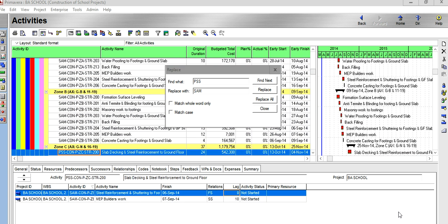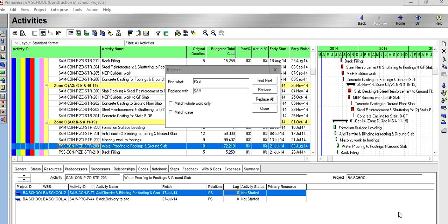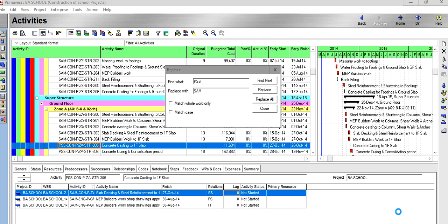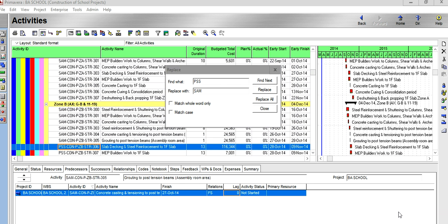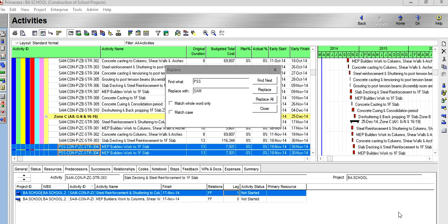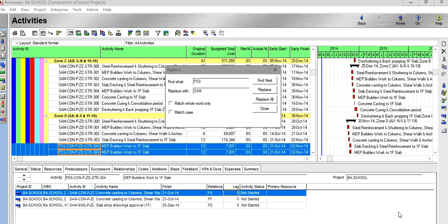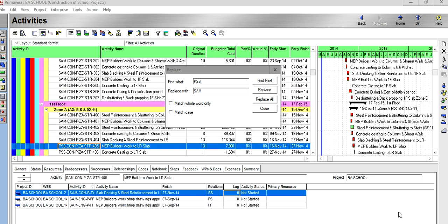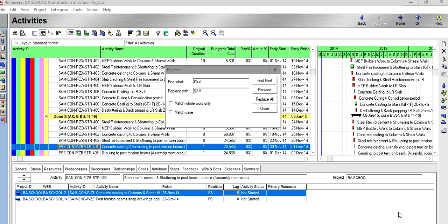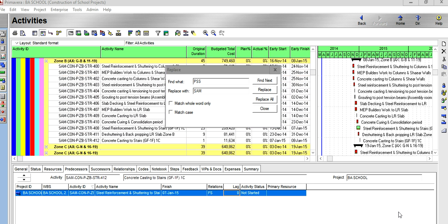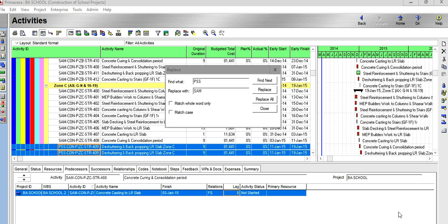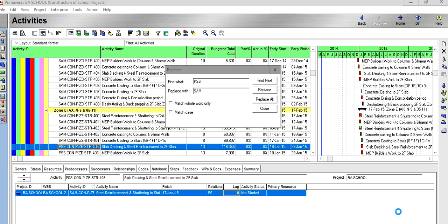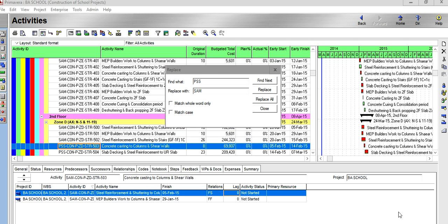But if the project manager can manage the baseline even without approval, the manage technique, so it is possible we can sort out. But normally here we are implementing. Sometimes the approval of the baseline is due to repeated comments. Sometimes it will take 1 to 2 months to 6 months before we get approval of the baseline. So that's when it will create it's part of the project failure.